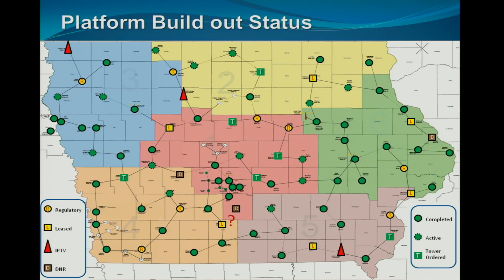And one of our learning experiences with Iowa is that the terrain is soft. So some of these holes end up being a lot deeper than anybody had anticipated. In some cases, normally we would have thought 25 feet, but we're talking 60 feet deep and 8 feet wide in diameter. I mean, these are huge, huge.